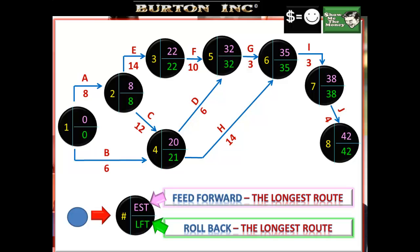And there we have it. All we need to go through now is identify the critical path. And remember, we identify our critical path where the EST, the earliest start times and the LFTs, the latest finishing times are equal. We can see that A, E, F, G, I and J has become the critical path. There can be no delays there, or else we delay the entire project.